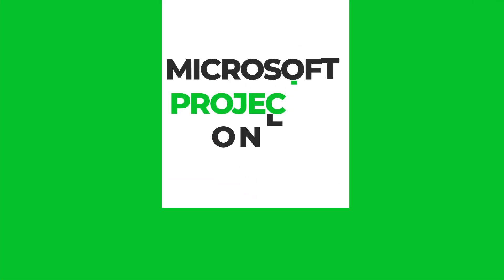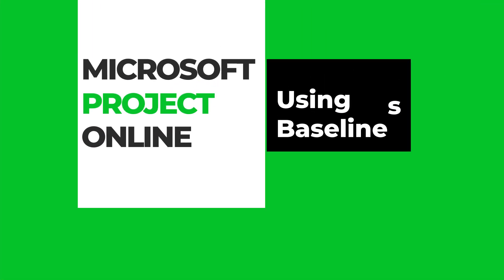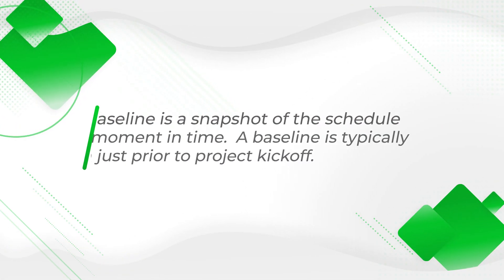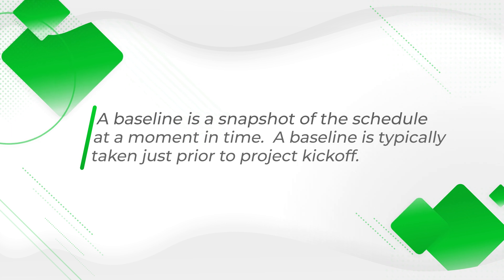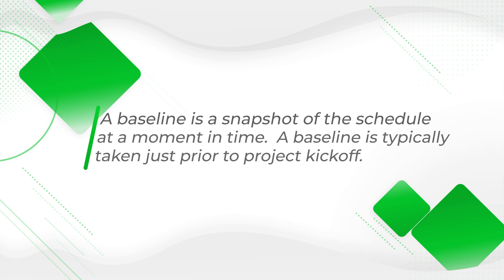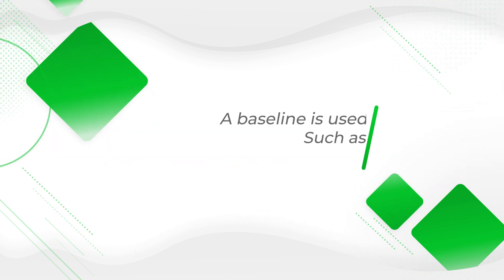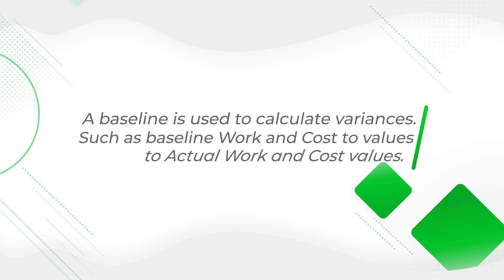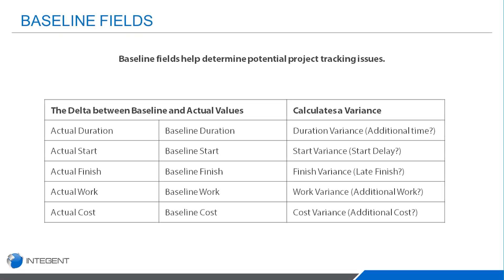Hey there. Today we're going to take a look at baselines. If you're not familiar, a baseline is basically a snapshot of the current state of your project. It can be used as you're managing and tracking your project progress — you can compare the baseline to your actual metrics, for instance your cost to determine if your project is on budget, or your work to determine if your project is taking more work than it should.